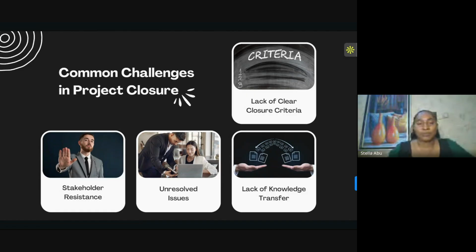Now, another thing about closure is lack of knowledge transfer. What does that mean? Remember I told you that no matter how much you plan, sometimes some things will not go as they're supposed to go. It is not for you to feel bad. It's for you to learn and say what did not work. That's why you always have a retrospective event after the end of a sprint, to say what did not work, what worked, so that you'll be able to learn. But when we try to close a project, we don't transfer that knowledge.